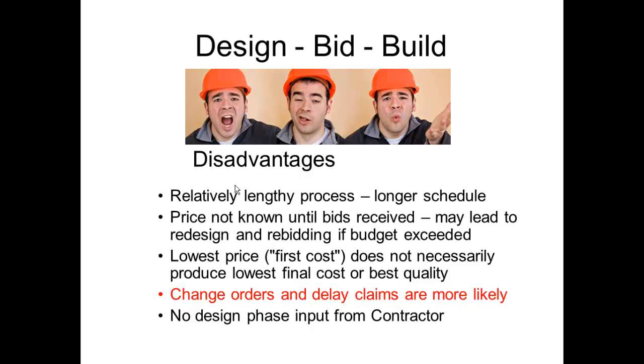We don't want to build something and say, okay, we're going to take out the HVAC system on the west wing and not have any air handling over there. Well, that's great, and it's going to save you money, but when you do have the money to do that and people are complaining that they're too hot or too cold, then we need to tear things apart to put it in. We don't want to do that. We want to keep those things that are permanent to the building in place and take out anything that might be above and beyond that or could be added later.